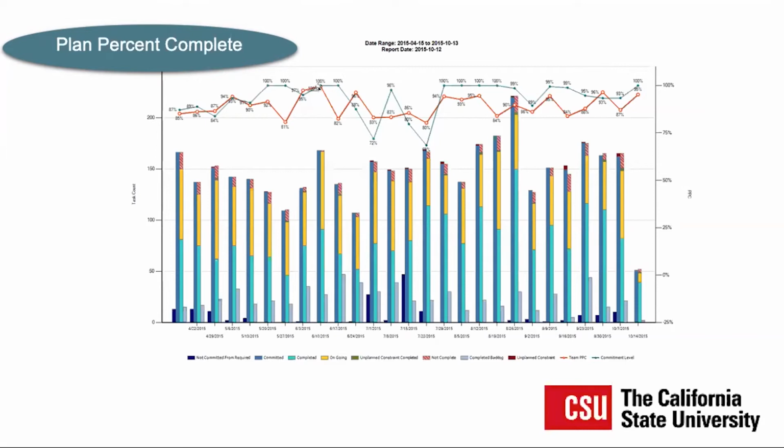If you hit 100% every week, week after week, that means you've got more buffer in your schedule than you probably need. I think I've shared this with Kevin before, but we went to a project at San Diego State maybe 5 years ago and took a tour for this particular contract. PPC was on the wall and they were tracking it by trade, which is okay, but you really want to look at how the team overall is doing. There were, I think, 4 trades that hit 100% every week over the course of the past 4 months.